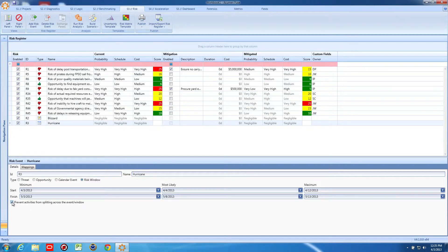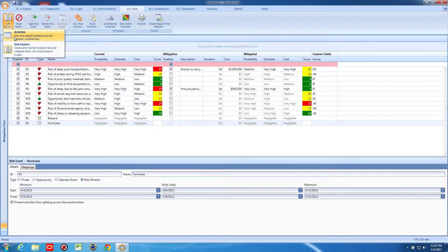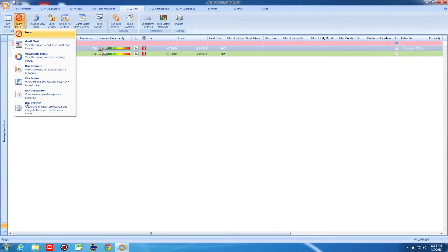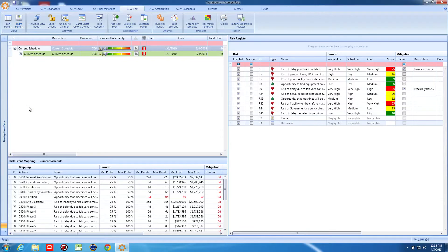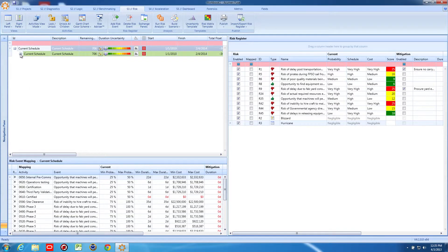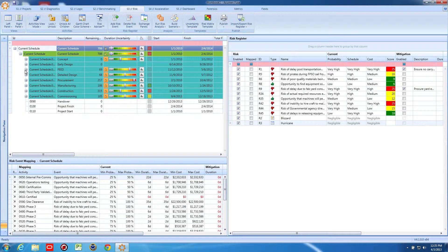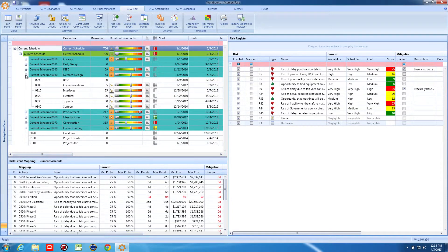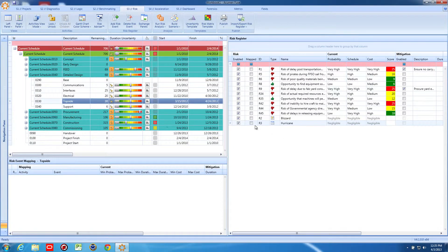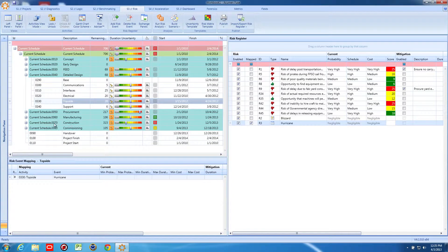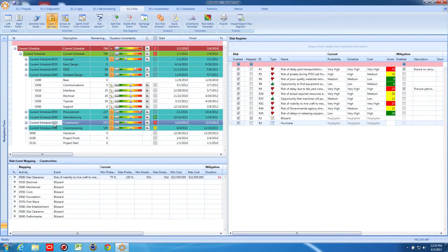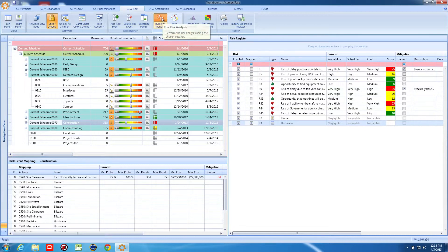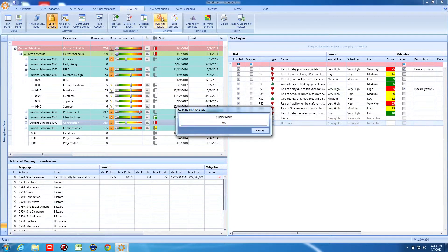As before, we have the flexibility to determine whether our hurricane will prevent us from splitting affected tasks or not. And last, but extremely important, is to map our hurricane risk only to those tasks or groups of tasks that will be impacted by the occurrence of a hurricane.